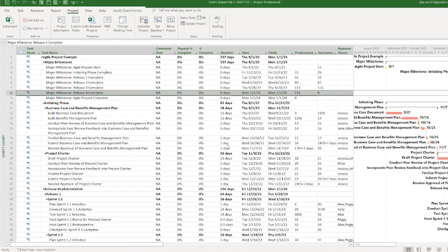The tough ones, the ones that don't allow any movement, are the must finish on and the must start on. Those are the really tough constraint types. Why? Because they don't allow your dates to shift afterwards. There is an example where CBP, a government entity, built their schedule and used a must finish on.